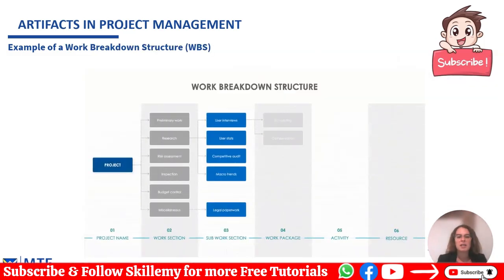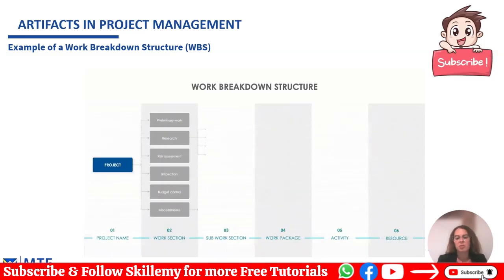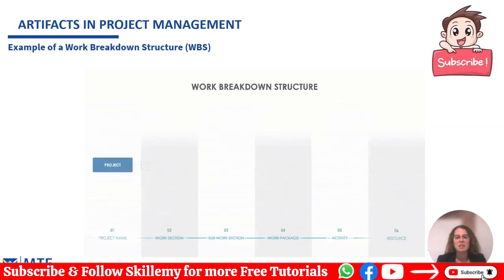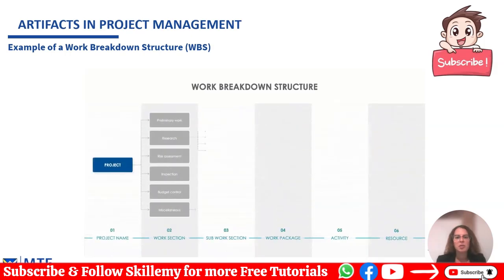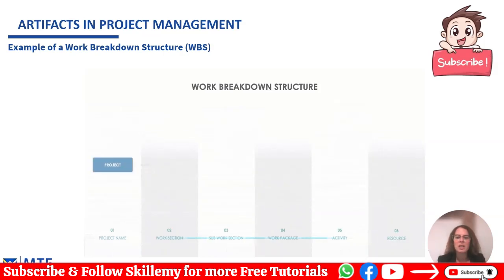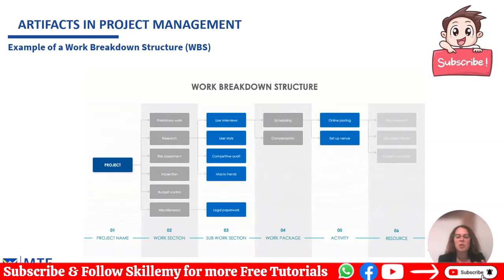Now let's examine an example of a work breakdown structure, or a WBS. The work breakdown structure is one of the most important tools in project management. Its purpose is to break down a project into smaller and more manageable pieces. Okay, the work breakdown structure is a hierarchical decomposition of the project. At the top level, you have the overall project. This is then broken down into major deliverables or into major phases. Each one of these phases is further broken down into smaller tasks or into work packages. So now the project is more manageable, okay?